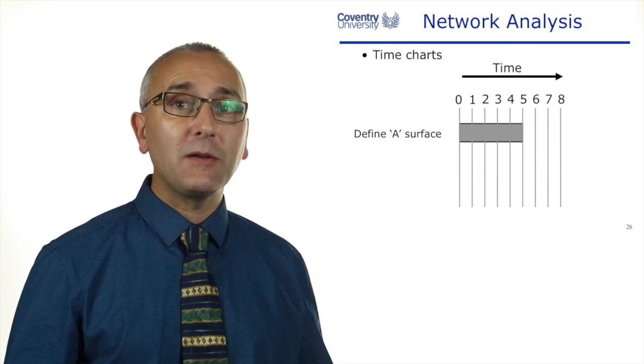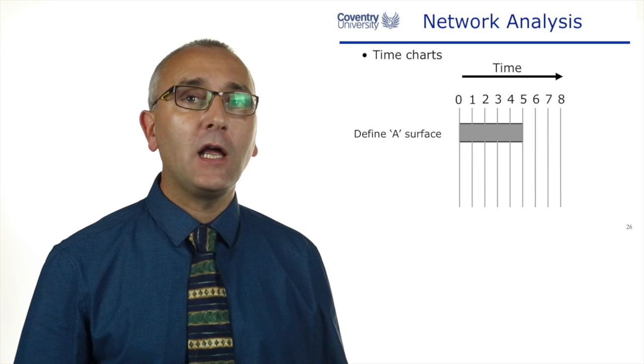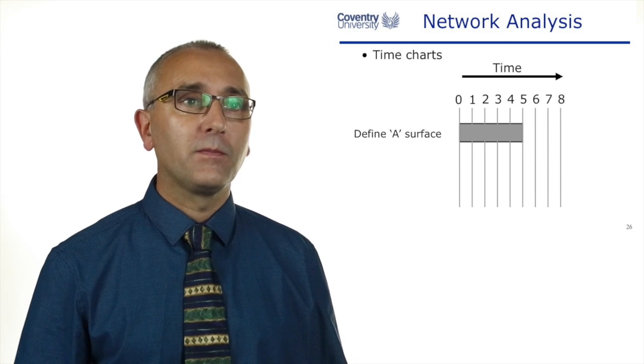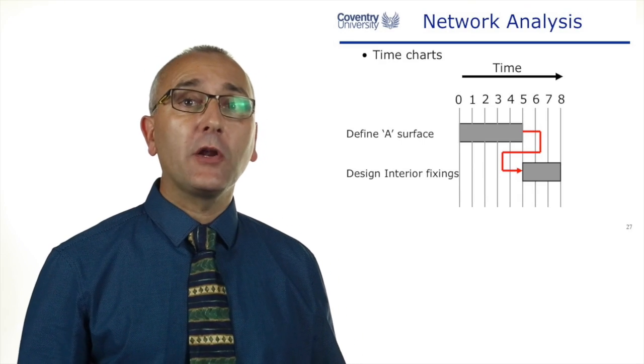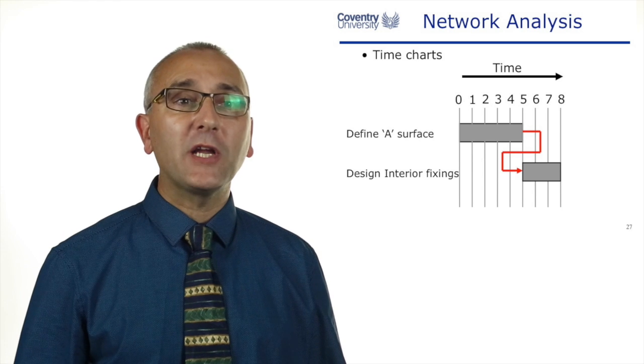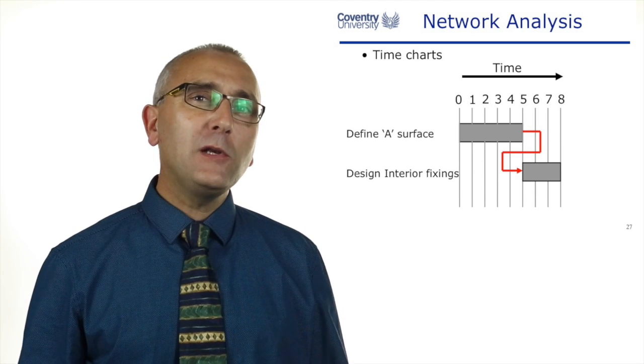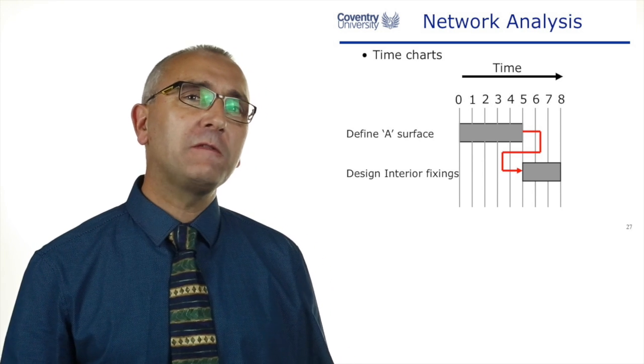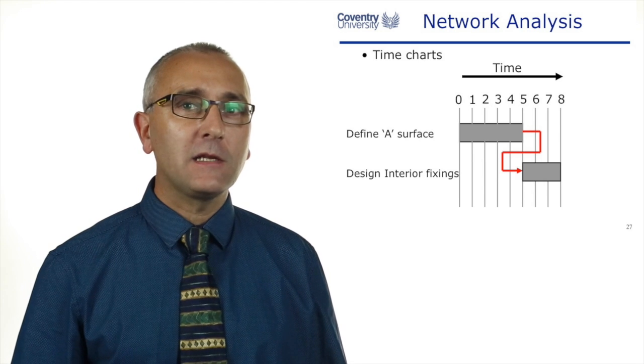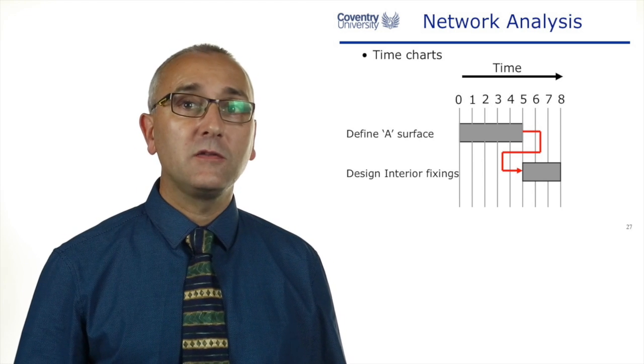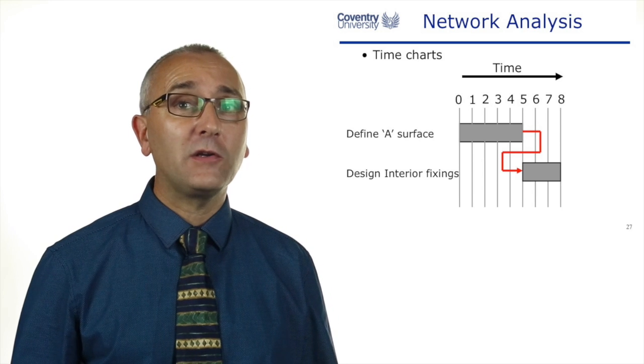A timing chart or a Gantt bar—we'll look at Gantt charts later in this lecture. Our dependencies are shown usually on a Gantt bar with an arrow connecting them. If we look at these two tasks, if the first task takes five days, I can't start the second task until the beginning of day five.